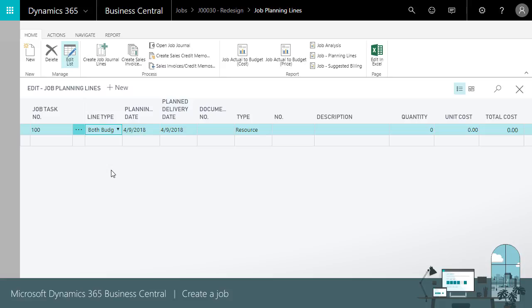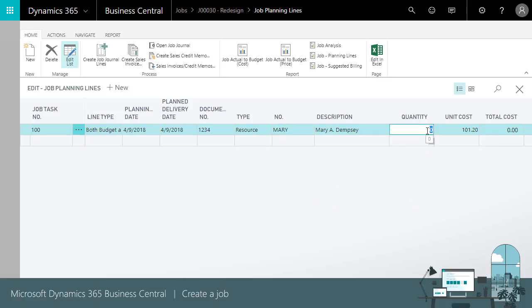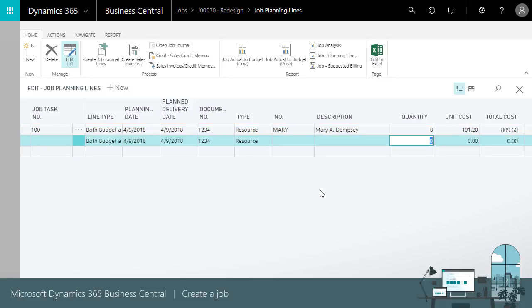We can also set the planning date and document number. Next, we'll add items and our resources, which are the people who will do the work, and the quantity. The cost and price amounts come from the resource or item assigned. We can add as many lines as we need.